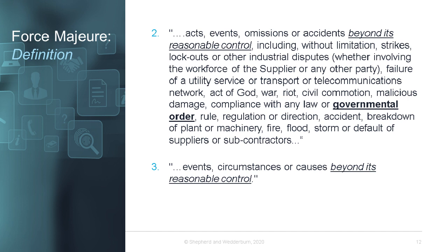The final example is less clear. The requirement that events are beyond the reasonable control of the affected party may be sufficient, but it's obviously not guaranteed. And whether or not the coronavirus outbreak would be caught would depend on the drafting in the clause, the particular circumstances, the intention of the parties, and the extent to which that intention can be proved. However, it should also be noted that the courts have previously said that the proper approach to the interpretation of a force majeure clause is by reference to the words the parties have used, not to their general intention.